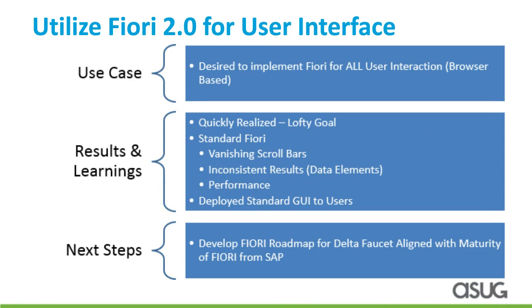So at one point in our project, we actually made the decision to go all Fiori all the time as the main user interface to SAP. As we started testing through that, we started to realize fairly quickly that while a lot of those Fiori apps are mature enough to be able to handle user interaction, there were some of them that weren't quite up to snuff, and so we ended up walking that decision back and going back to the SAP GUI again.